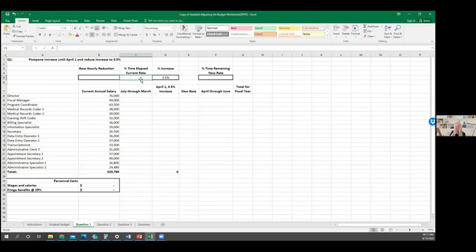This time we want to go July through March, and we're just going to implement the cuts at the end. So here we can type in equals 8 out of 12, right? Instead of 50%, we're going to do 8 months out of 12, and then hit enter. Notice it calculates for us that that's 67% of the year. Over here in our new time rating, if we take equals 1 minus the first part, because this is going to give us the second part, that's going to leave us with 33%. So now we can use those absolute references to fill in our charts.